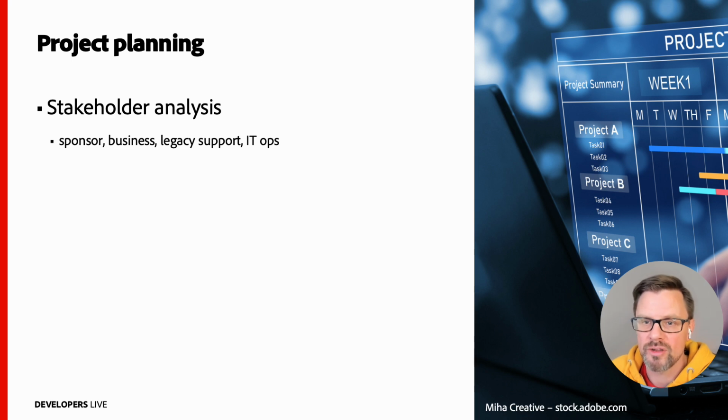Remember, there is a reason why you or your customers want to migrate off the legacy system. If that system was well maintained and well documented, there probably would not be a reason to migrate at all. So be prepared to have long and frequent deep dive sessions with the business users. In the planning phase, we must get a strong commitment that these power users are available throughout the whole project. But be also prepared that they will not be able to answer all questions for you. They're just users of an as-is system, and rarely have they been involved in decisions that have been made when the system was first set up.